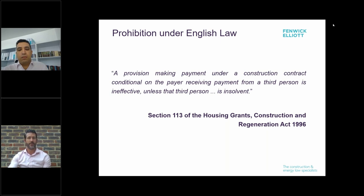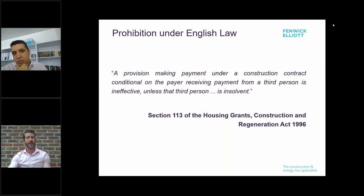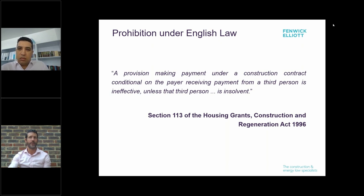It's worth pausing to consider why these provisions were introduced, particularly since they are not common in other jurisdictions. On first blush these provisions may seem unreasonable to the contractor — they're in a situation where the employer has stopped paying, so why should the contractor have to pay the subcontractor and be left out of pocket? The short answer is that the contractor is in control of the relationship with the employer to the extent the subcontractor is not. The contractor has the ability to exercise rights under the main contract to enforce payment from the employer. If the contractor chooses not to exercise those rights — perhaps to protect a long-standing commercial relationship — why should the subcontractor have to wait?